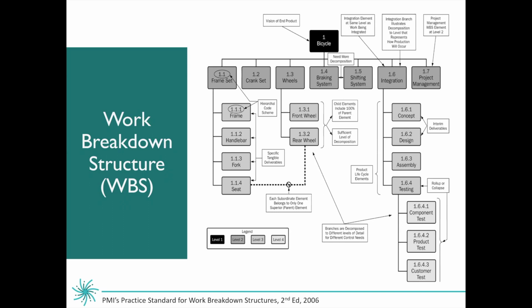I'll give you a few tips for knowing when enough is enough when it comes to breaking it down. I do want to point out, this would be the lowest level, or that work package level, for integration. So you will see that testing, the lowest level, gets broken down into 1.6.4.1, component testing, product testing, customer testing.